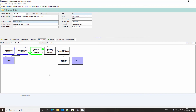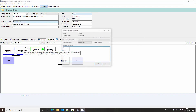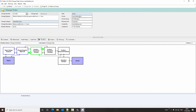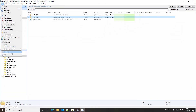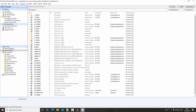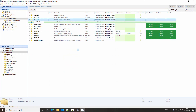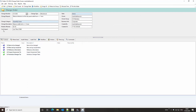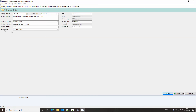Now we've had the change order approved. If we assign this to another user in the group — I'm going to assign it back to myself, and remember I'm also a change order controller — then we'll see the impact of this. It's now been reassigned to myself, so we'll log back in as Mark. If we look for the change order folder, because I am a change order controller, I've still got visibility of the cost impact attribute. But if I go to edit this folder, I still don't have modification rights on change type or cost impact, because the state of the folder is now active, and we can only modify these attributes at a proposed state.